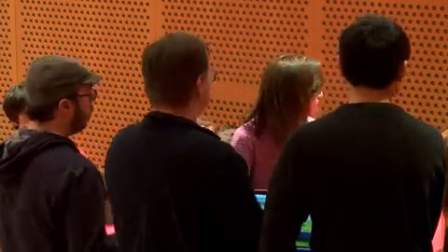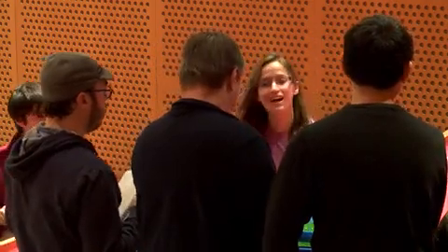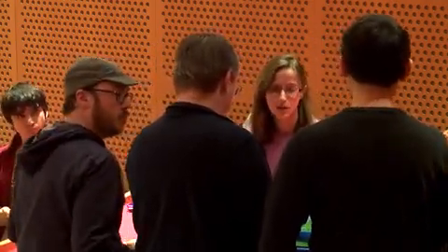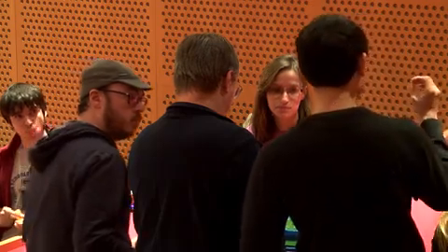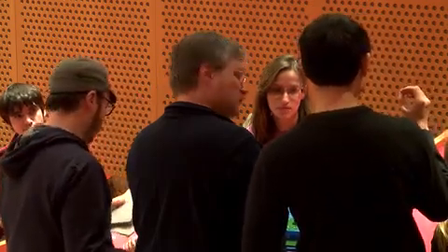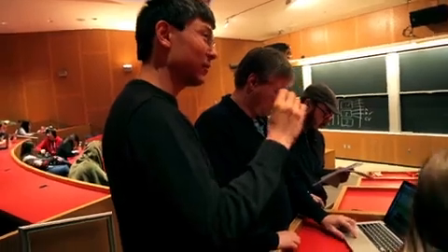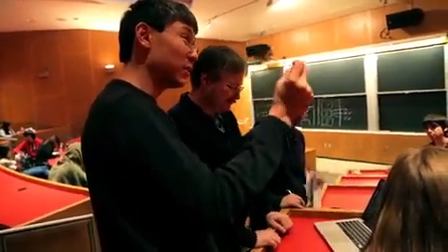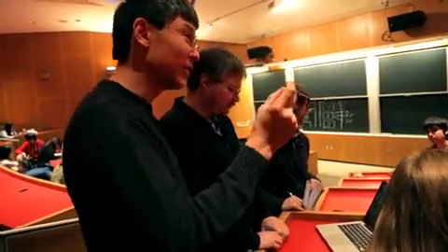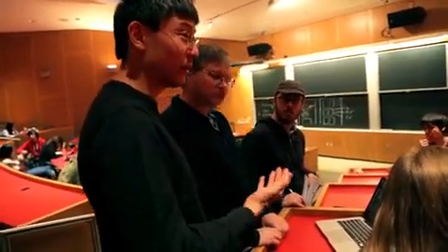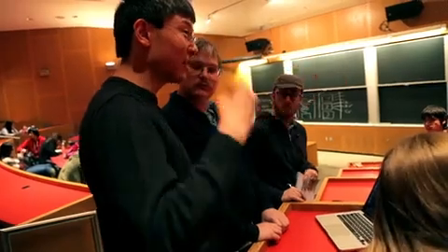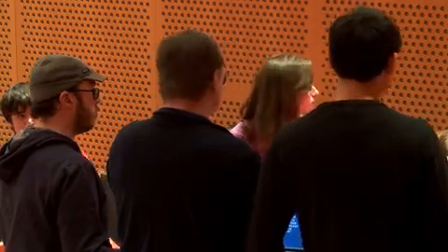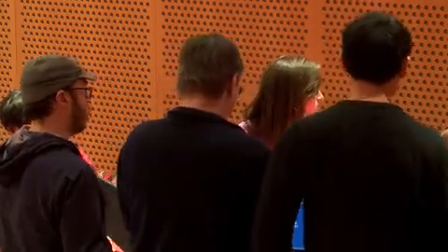Oh, you guys don't think I need to do the art? I'd just not do the art. Well, the art is awesome, but it is also a huge bottleneck. If you fall sick, and a lot of the reliance on your art to convey very important information falls through, then the project fails. If you don't fall sick and you get all your stuff done, your game just looks better and it's awesome. Since we have placeholders, if for some reason I don't finish, we can just use what we've got now.